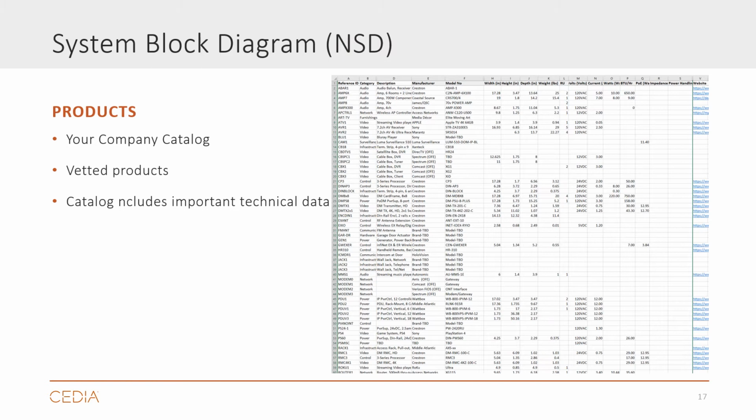The catalog includes the physical and electrical data needed to correctly engineer the system. The spreadsheet and block diagram are easily linked together. The block diagram is then used to generate the bill of materials, power and ventilation requirements, schematic and rack elevation drawings. You can easily build your own spreadsheet, or other companies may provide that service.